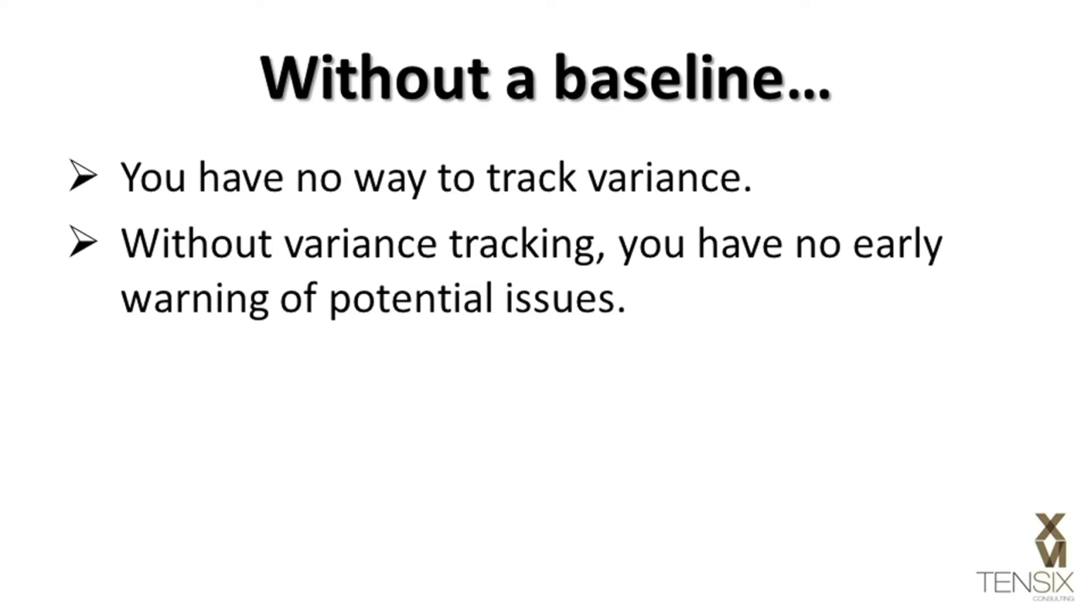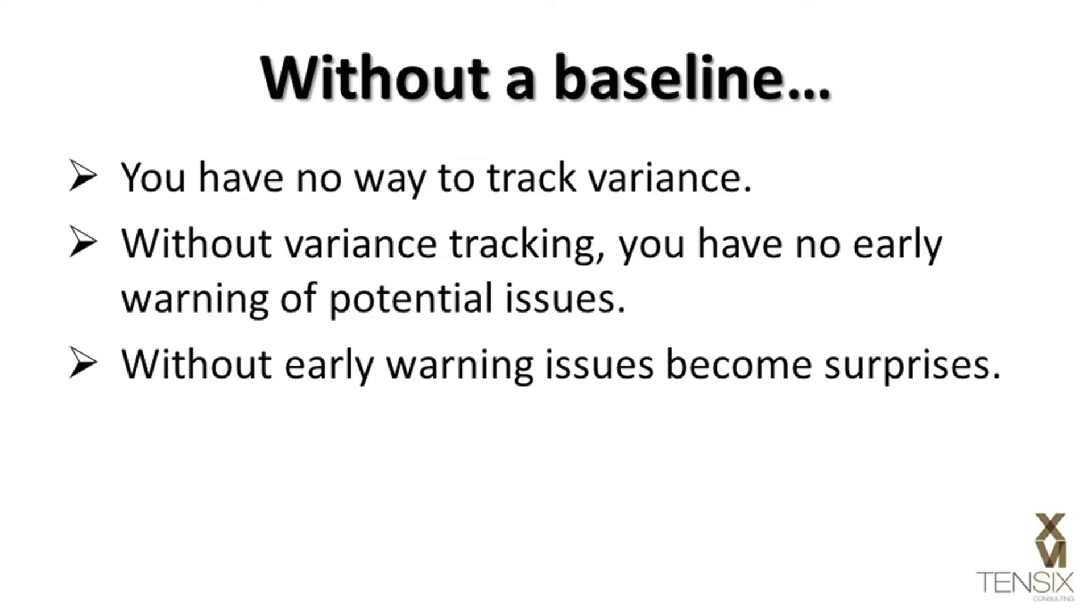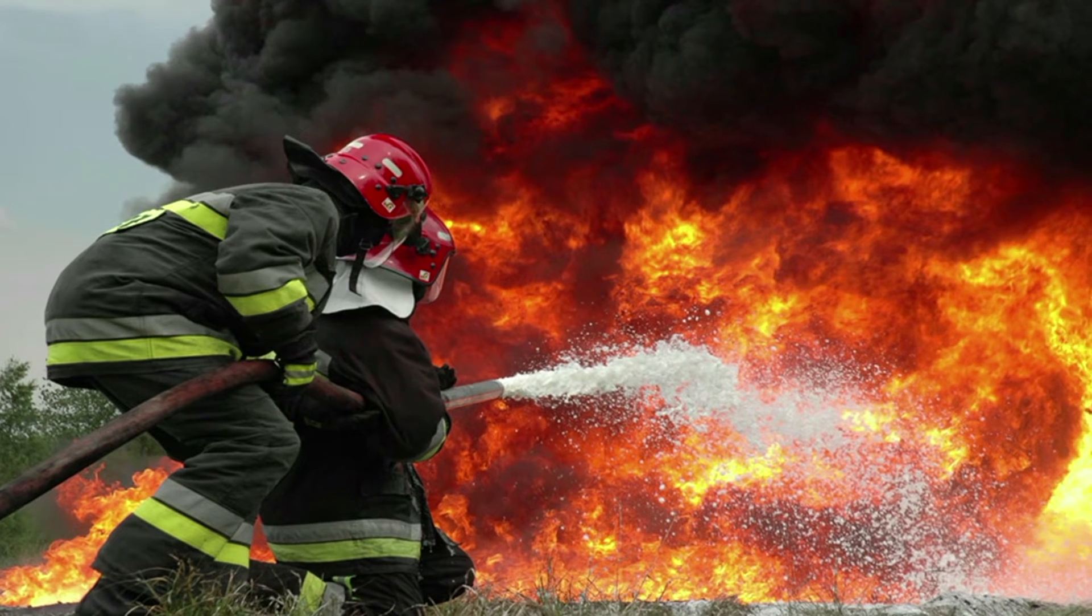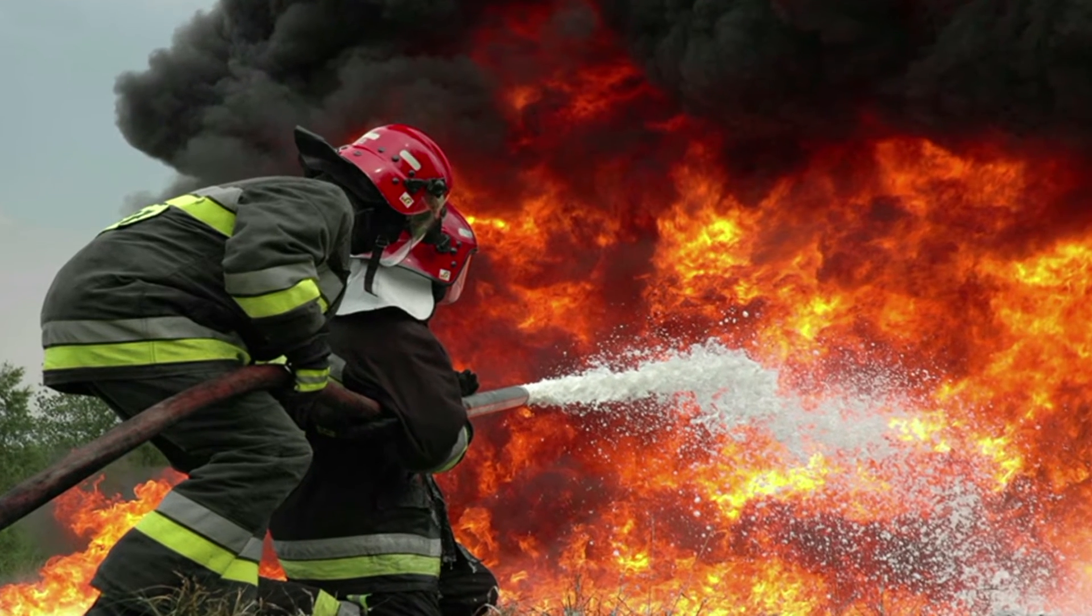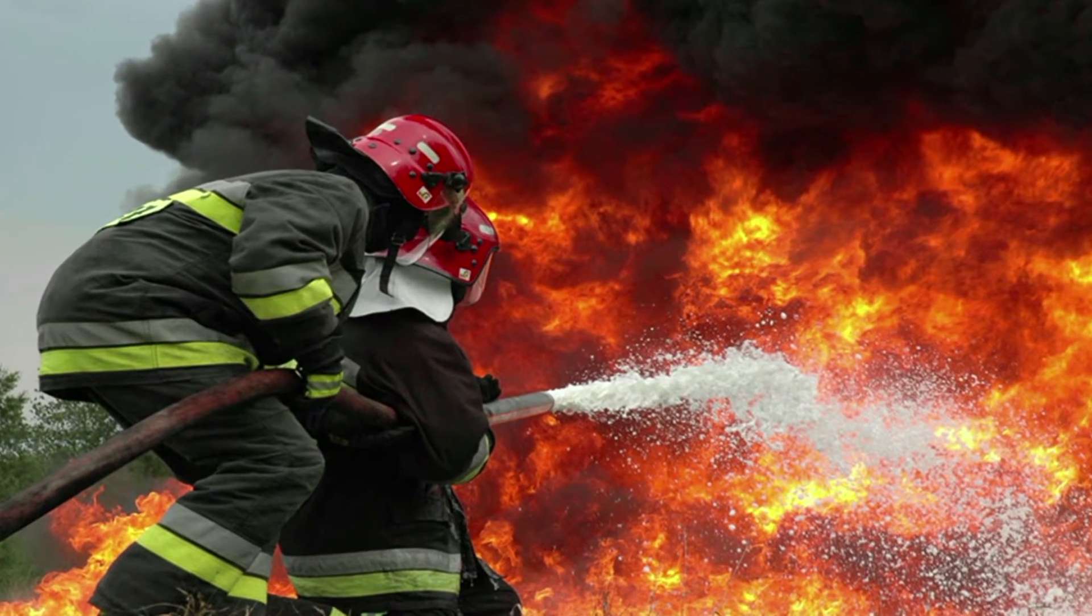Without variance tracking, you have no early warning of potential issues. Without an early warning, issues become surprises, and the entire project eventually deteriorates into an ongoing firefighting process.